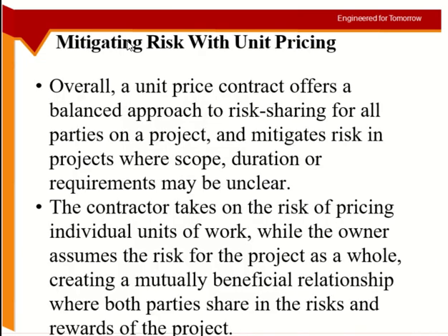Okay. So overall, just a wrap up, there are risks involved in this type of contract, both for the client and the contractor, because the client doesn't know the final price, and the contractor is taking the risk of quoting a price for something which may go up and down. So the balanced approach is you agree on a mechanism for risk sharing, which was not in the previous example, by the way. They did not mention what they will do if the market suddenly drops or increases.